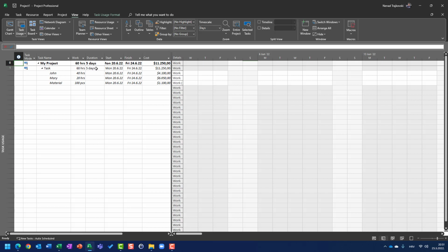Now, let me show you again. If I now extend this task to, let's say, 4 days. Now, let me explain the calculation. The calculation is 4 days multiplied by 8 hours per day for John, because he is assigned 100%, is 32 hours. Mary is going to work 50% of that, is 16 hours, and for materials, we have 100 pieces, let's say 50 pieces, okay? Okay, now I change everything. Let me show you the calculation.